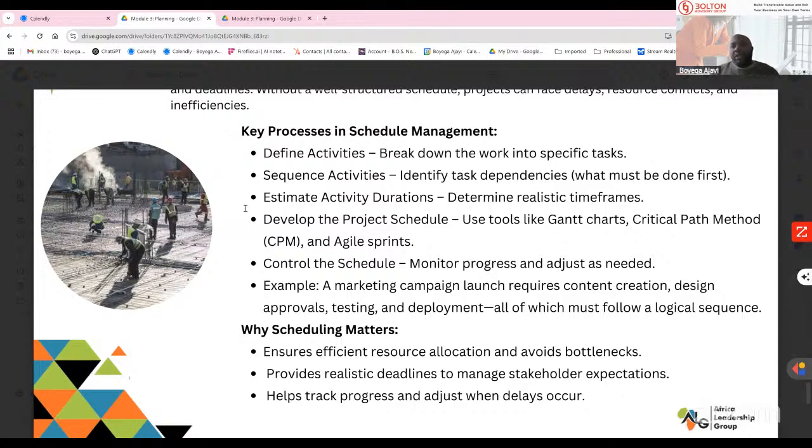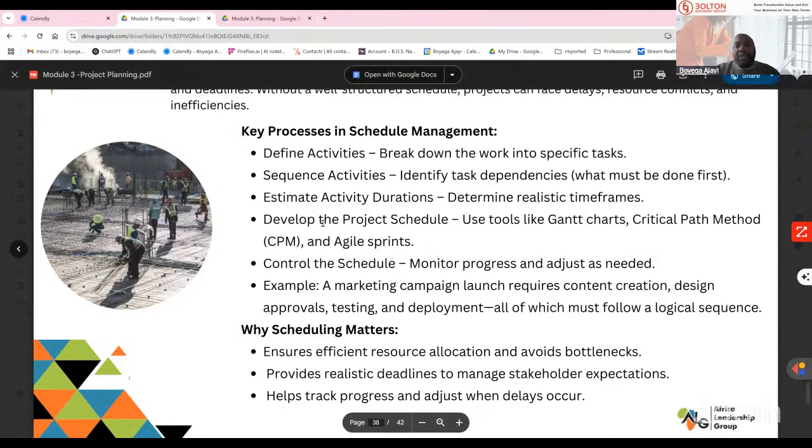But obviously, with a construction project, you can see with your eyes, so you know what to do. But what if it's a soft activity like the digital banking project? You can start many things, like the marketing campaign. Maybe you start it before you build the app to build momentum, but you probably want to know what the product is going to look like. So maybe the marketing activities start when you're 50, 75% into the project. Those are some of the things you need to think about when you're doing a schedule.